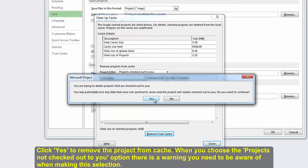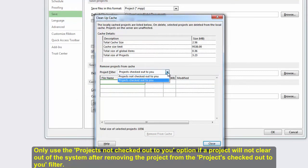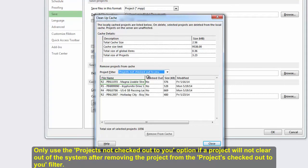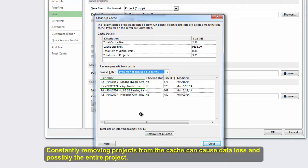When you choose the Projects Not Checked Out to You option, there is a warning you need to be aware of when making the selection. Only use the Projects Not Checked Out to You option if a project will not clear out of the system after removing the project from the Projects Checked Out to You filter. Constantly removing projects from the cache can cause data loss and possibly the entire project.